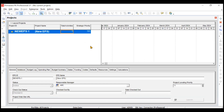There is something called OBS — Organizational Breakdown Structure — which is nothing but the hierarchy or structure of the organization represented in P6. This is done so that you can assign the responsible manager to the respective projects. For example, if a residential flats construction project comes in, it has to be assigned to the construction head. For that purpose, an Organizational Breakdown Structure is required.